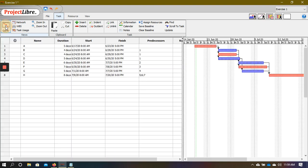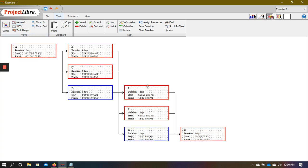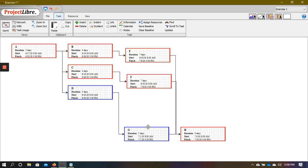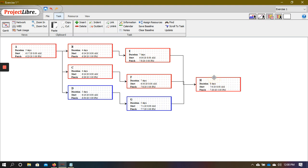Now we can go back to our diagram and delay the next activity after B, which is E. Let's delay that by one day and make it seven days. And if we go back to our network, voila — we find that now the top two paths are now critical and the bottom path is non-critical. So in essence, when we consume the float of the non-critical path activities, they actually also turn into the critical path. The funny idea is that you are consuming the float, yet the ending date of the project is not changing. The total duration of the project is still 24 — you can add across the top path and that's now 24, and you can add across the bottom path and that is also 24. So no change has taken place.